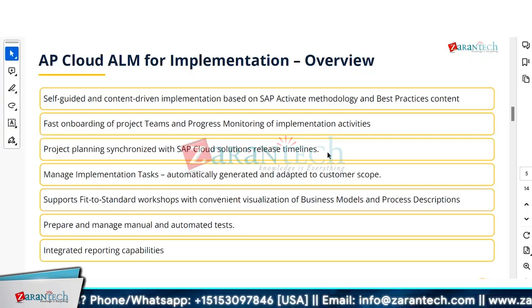So he mentioned that we have specifically mentioned that we want modeling for all processes which are in the scope, and no one had worked on it, because obviously when they started, even the customer did not know, and there were very few customers. It was more all standard. So that was a payment milestone, that all the business processes which are part of the scope and which will be delivered, the process diagram is part of the deliverable.